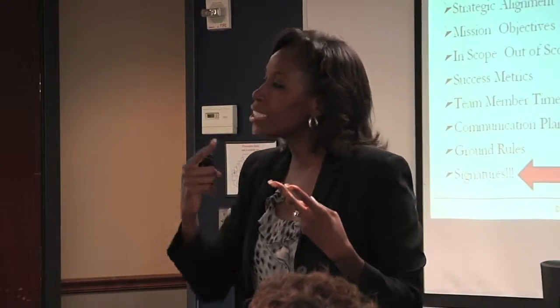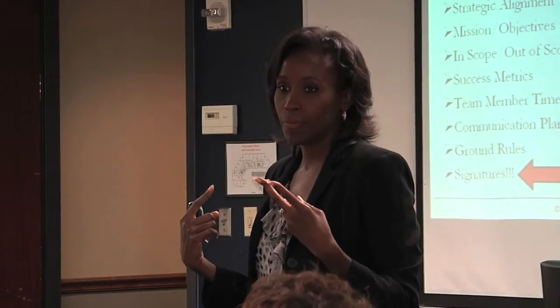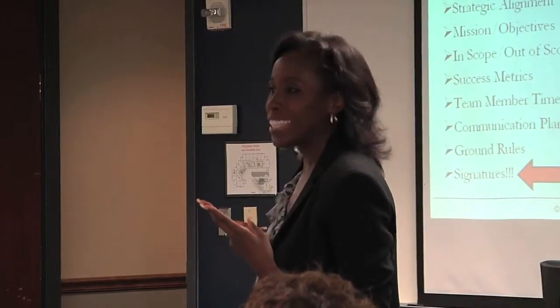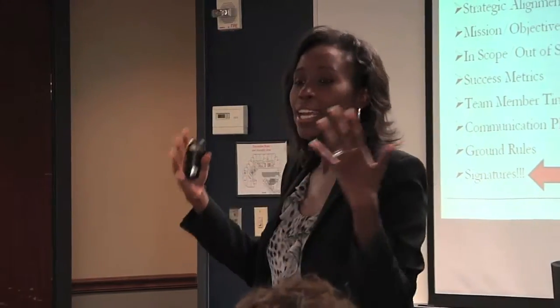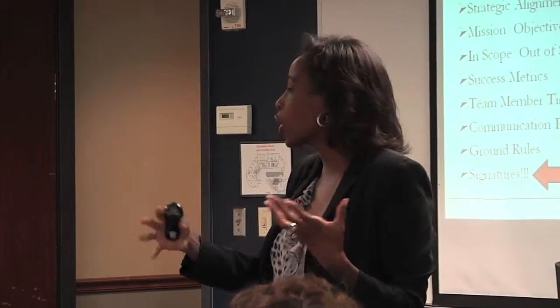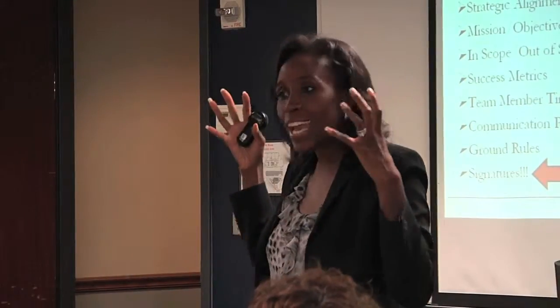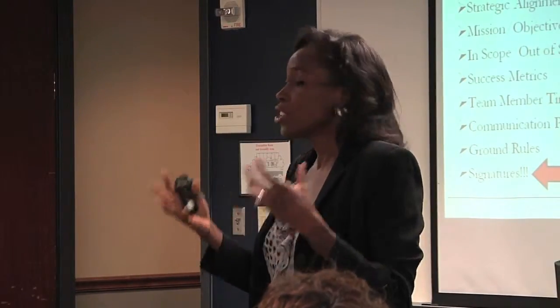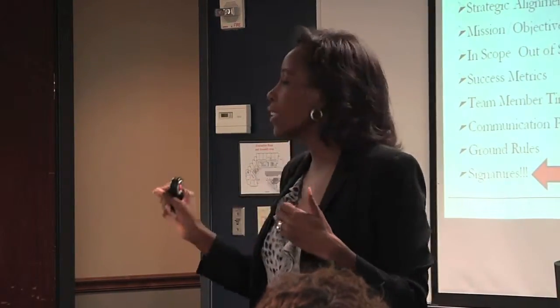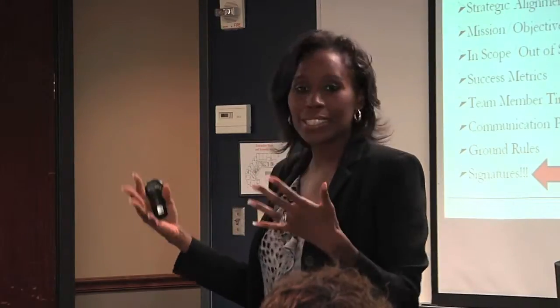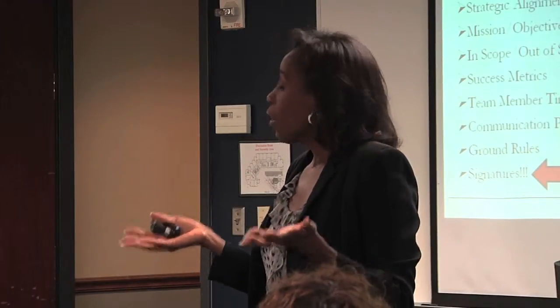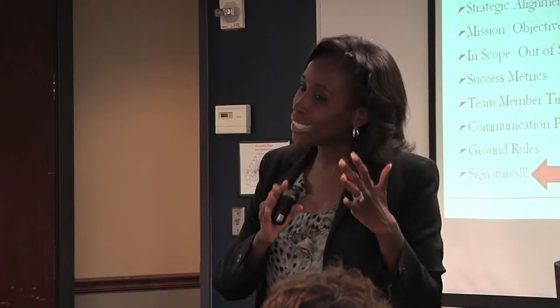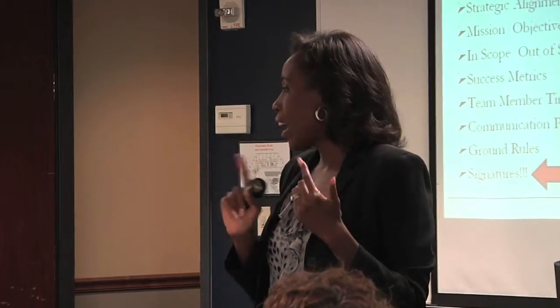Secondly, they participate in the conversation differently. I don't spring this on them at the end. I let them know from the outset, hey, we're developing this team charter. I want to be sure it's something that everybody buys into. So part of that process is I want all of us to sign it just to indicate our level of commitment. When they know they're going to have to sign from the beginning, it changes how they interact.